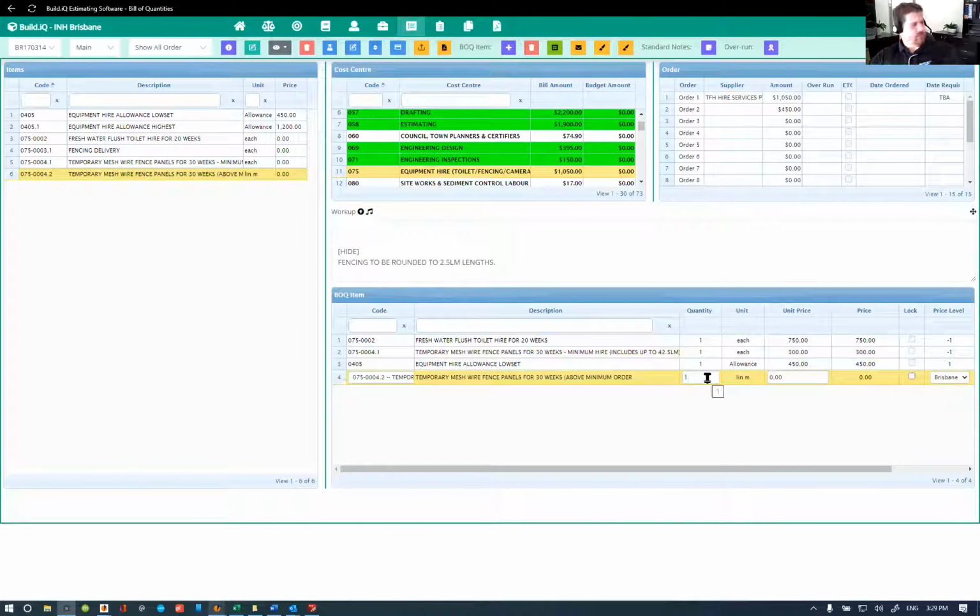Now the timber frame and truss, that's, I guess, going to be a bit of a tricky one. We're going to have to just take a bit of a punt on that basis. We've got one house which was 12,175 and its total house area was, bear with me a moment, it was a standard 2,400 ceiling and it was 155.39, which worked out at about 78.35 a square meter.